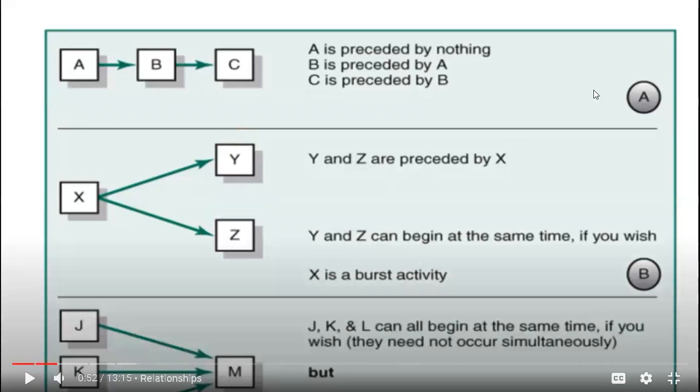All right, let me explain the burst. X goes out to Y and Z, so it's like something is opening, like it bursts open. So the predecessor for both Y and Z is X. So X feeds into both Y and Z. While the one that follows below, we're gonna see it's a merger, right? Where everything comes together. While J, K and something else go to M. And Z bursting from X.